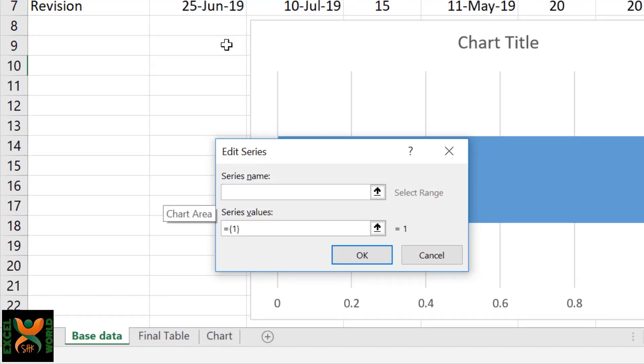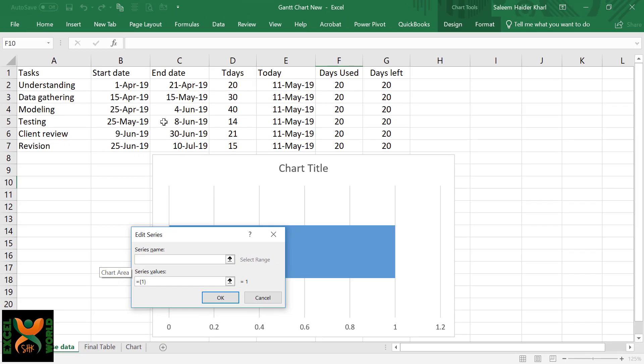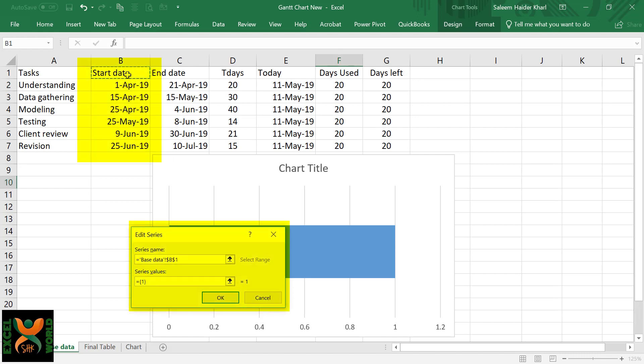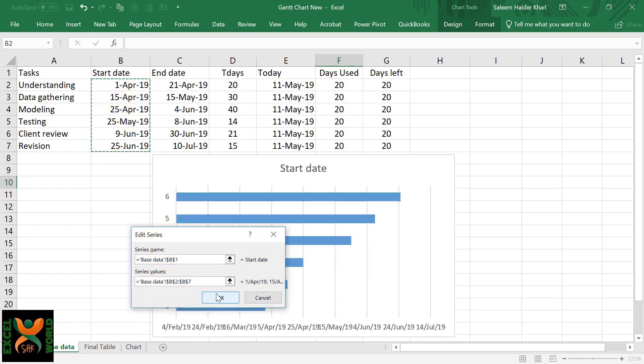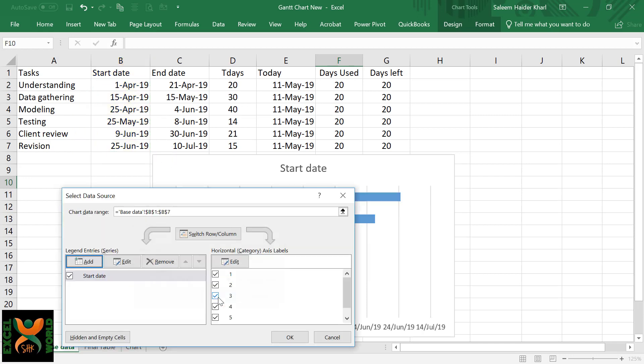Click Add, and for the first series we are going to select the start date because this will actually identify the date when the task is going to start. So series name: Start Date, and series values: all of these. Press OK.